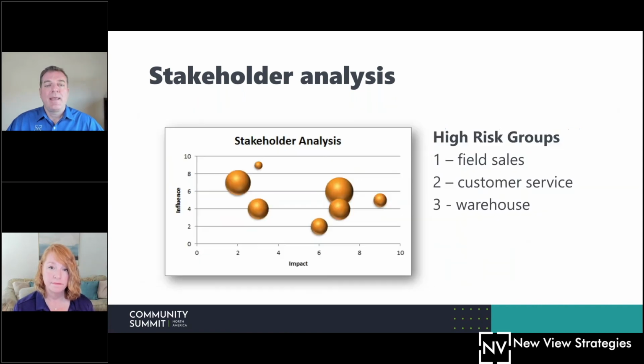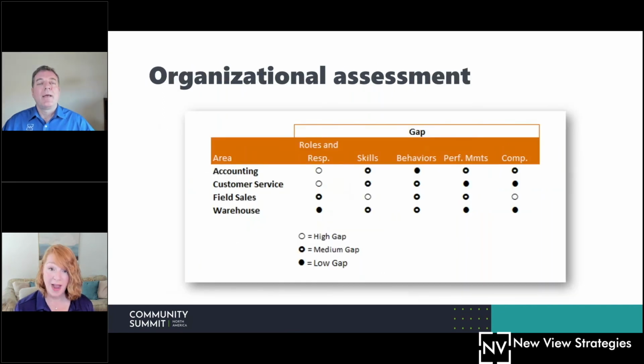And what this is, just another representation to really hone your focus, right? You take the stakeholder analysis and map it against influence, impact, and the size of that group, and boy, that paints a pretty clear picture of where you've got to focus pretty quickly. And by the way, graphs and charts are a great way to share this information throughout the project. Indeed, yes, great point.